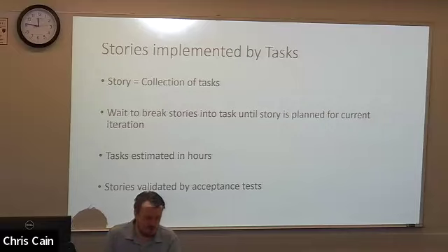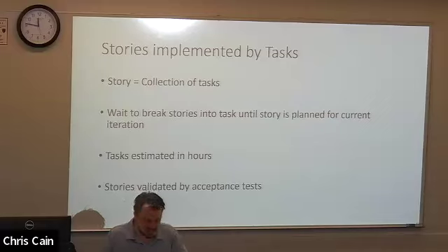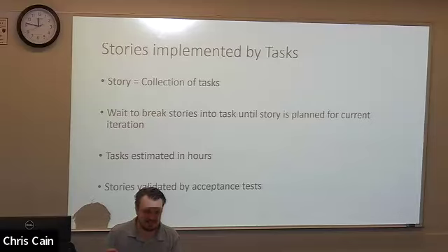Think of it like small, medium, large. Break them into something discrete and reasonably measurable, where small is 1 to 3 hours, medium is 3 to 6 hours, large is 6 to 10 hours. Maybe you have a very large that is more than 10 hours. Come up with a system that works for your team for labeling the tasks.